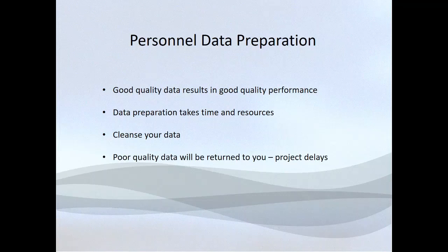Deadlines. We'll agree a date by which you will complete the data preparation. If you miss this deadline, we can't guarantee to migrate your data by the date on your project plan. This may result in your implementation being on hold until we have resources available. And during busy times, it may result in project delays of several weeks. So, let's get it right first time.